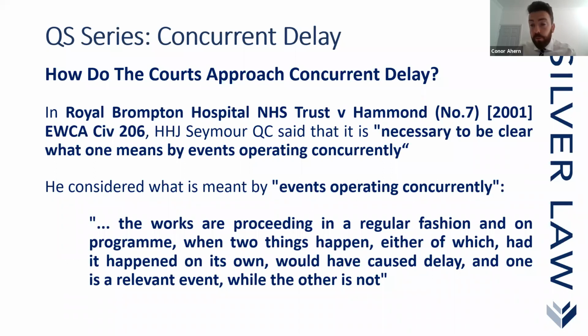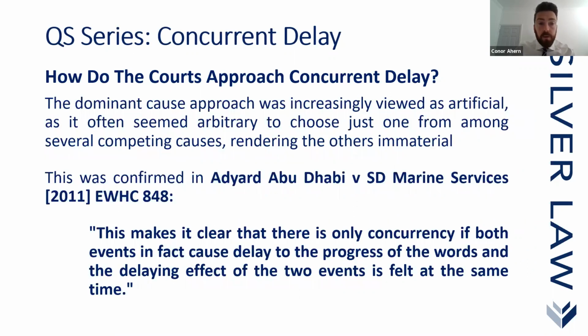Very important, obviously, that one is a relevant event, because if neither is a relevant event, there won't be any concurrent delay. It will simply be a contractor's delay, and he will not be entitled to an extension of time. So the dominant cause approach has increasingly been viewed as artificial, and it's often seemed arbitrary to choose just one from among several competing causes, rendering the others immaterial.